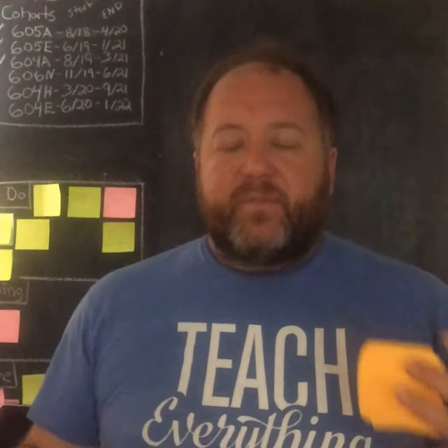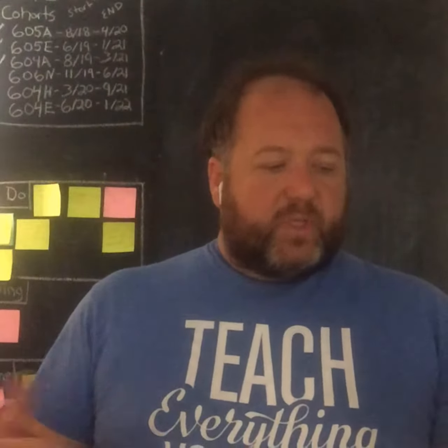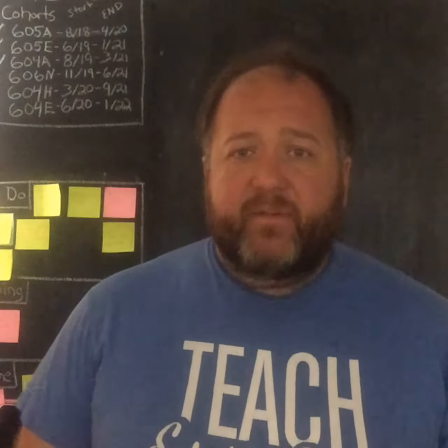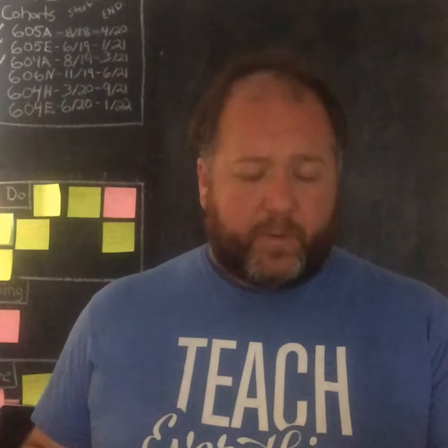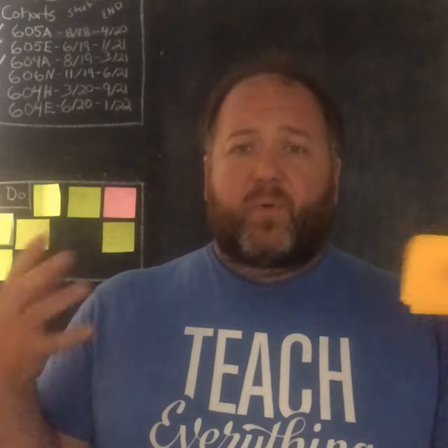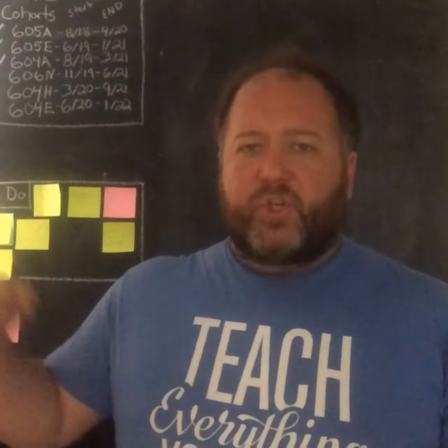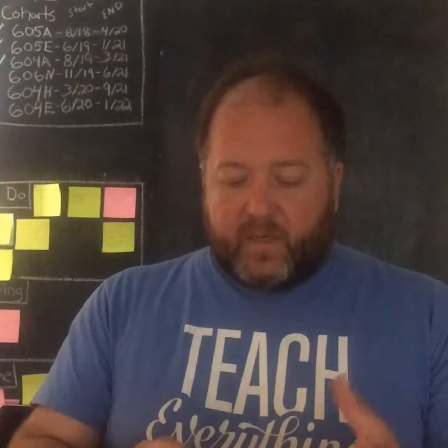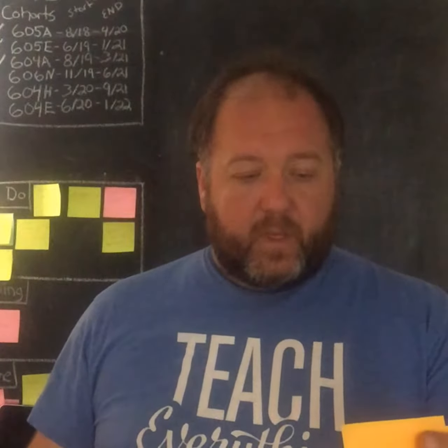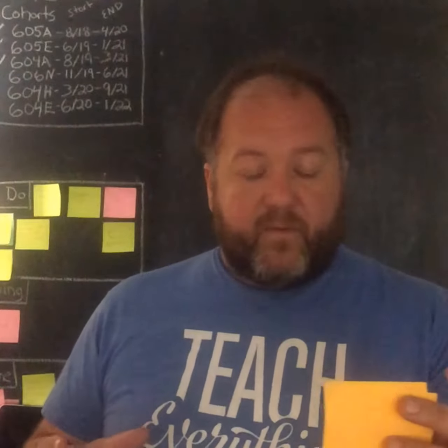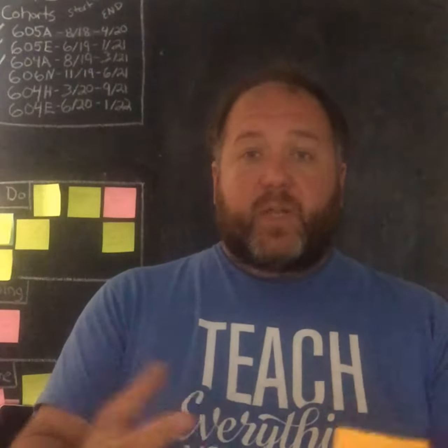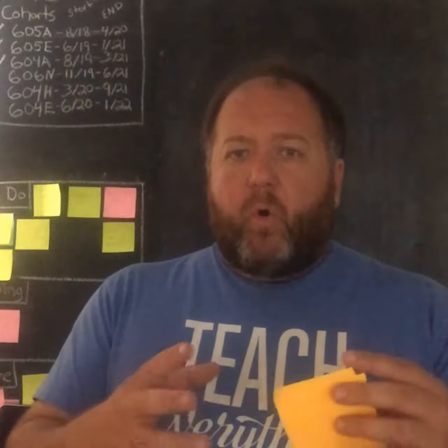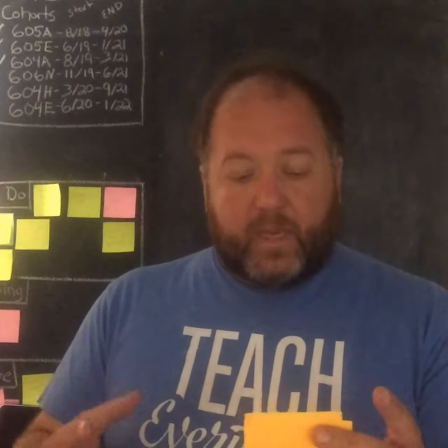So the different steps in a project usually follow the quick and messy outline I'm going to share now, and they may be called different things in different places, but they all follow this general pattern. The first step in a project is that the project is chartered, kind of like you're chartering a boat for yourself. This is when the project is described, defined, and has that initial kickoff. In that definition, you should have the requirements for the project itself, for the product that's being created. And this should include any assumptions or constraints that you may have going in.